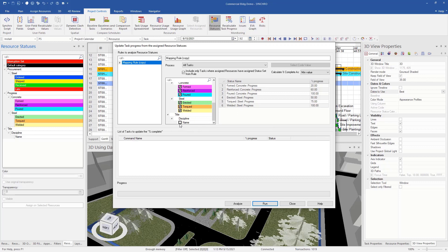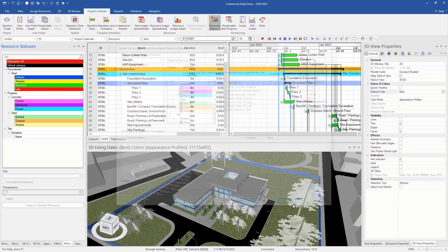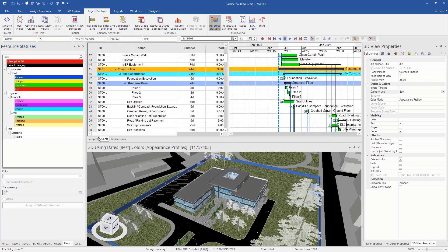So once we have these set up, we can see I'll select the name that I created here and then just simply give it a weight that you want. When you're done, simply hit close and you have your statuses that require percent progress assigned.